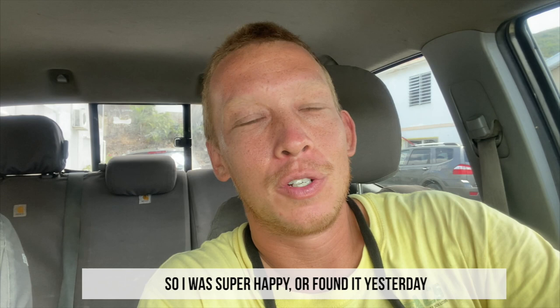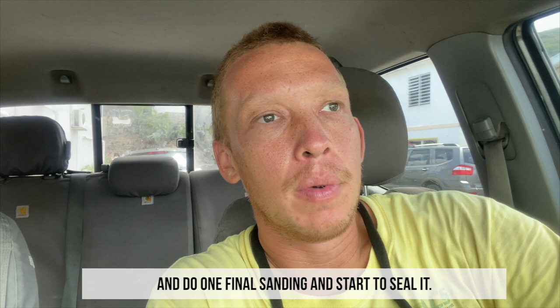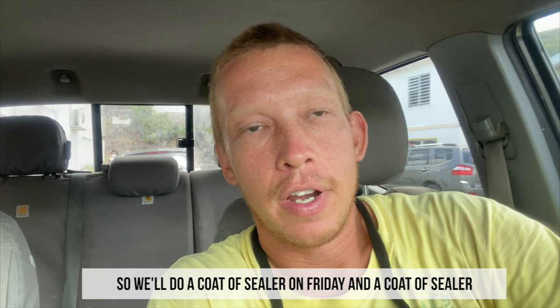Found it yesterday. And today we're just finishing up the sanding and reapplying another coat of cement. And then on Friday we're gonna go back and do one final sanding and start to seal it. So we'll do a coat of sealer on Friday and a coat of sealer on Saturday, and then the final three rooms will be done.